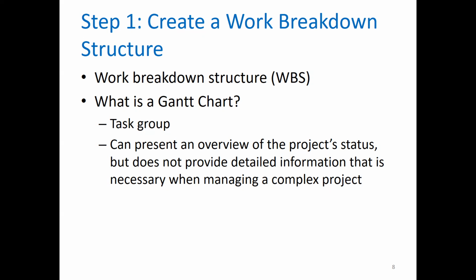So WBS involves breaking down a project into smaller tasks. You have a phase, let's say the planning phase. That planning phase is divided into, let's say, about 5 or 6 smaller tasks. For example, you have the planning phase divided into preliminary investigation, feasibility study, systems requests, reporting, and so forth. That's the work breakdown structure: it involves breaking down a project into smaller tasks.